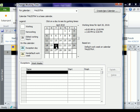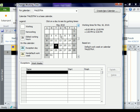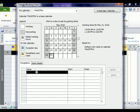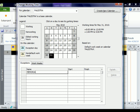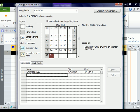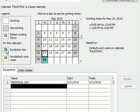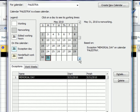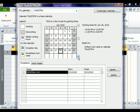So I need to go through here and look and see when are the next days that the company has off. I believe the 31st at this point is Memorial Day. So I'm going to come in here where it says name. I'm going to click on the date that the event is happening. And then I'm going to click down here where it says exceptions and type Memorial Day. I'm going to click enter and it's going to say start and then finish. And what you'll notice is now the 31st is red. If I click off it, it's highlighted as an exception day, which basically means when I click on it, it's non-working. That means Project will not try and schedule any activities on that date, nor will it allow me to schedule any activities on that date. I always try and take my calendar out at least three months past when I think the project is going to end. That way I don't have to remember to do it later on.